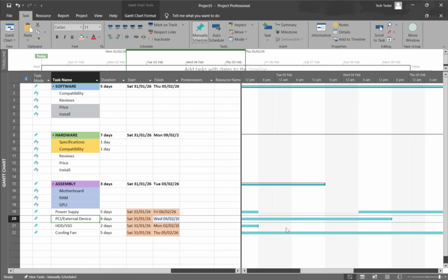You can also change the task's overall duration in the Duration field. Project will recalculate the task's timing and work based on your scheduling settings and any resource assignments, keeping dependencies and calendars in mind. If you decide you don't need the split anymore, it's easy to remove.